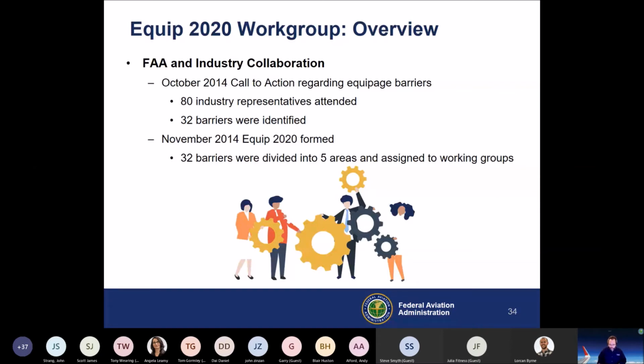User awareness and education, sort of getting the word out. Lack of metrics at the time of tracking who was equipped and how quickly they were equipping. Lack of clarity concerning viable navigation sensor options. Ability of FAA to maintain, schedule, and implement ground systems and capabilities to use ADS-B out. Need to establish and communicate aircraft manufacturer service bulletins, certification, on and on. So a lot of these are just around the process of getting there. How are we going to do all this?